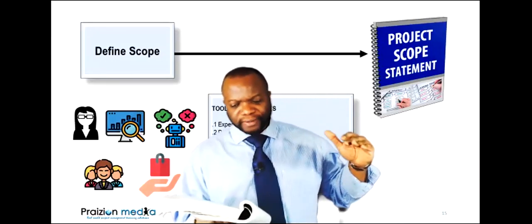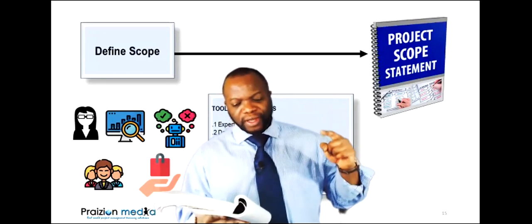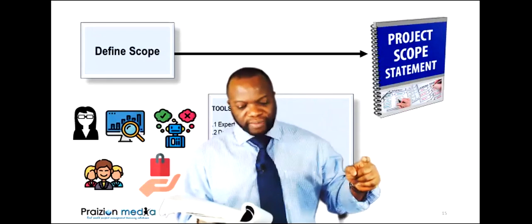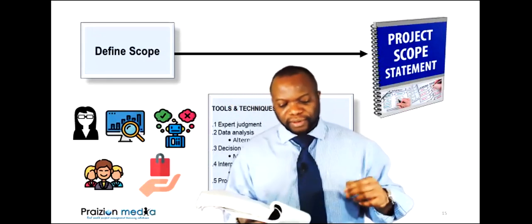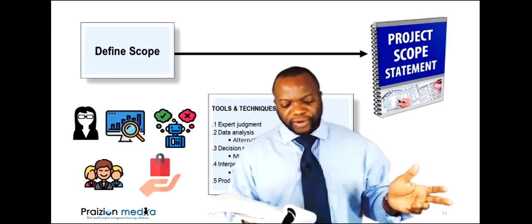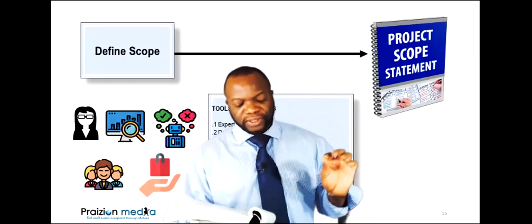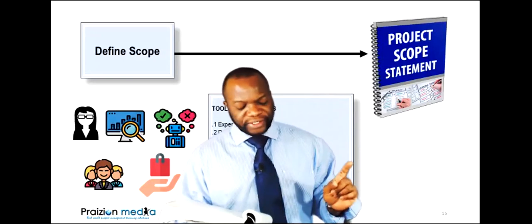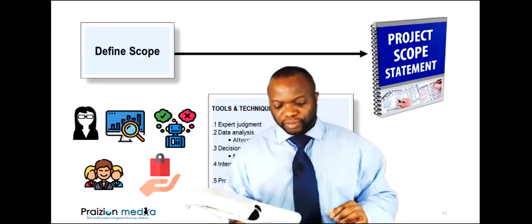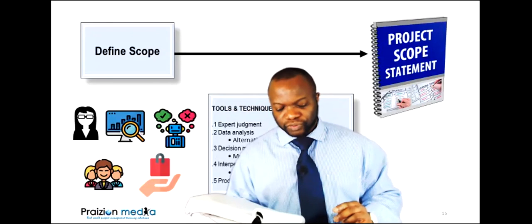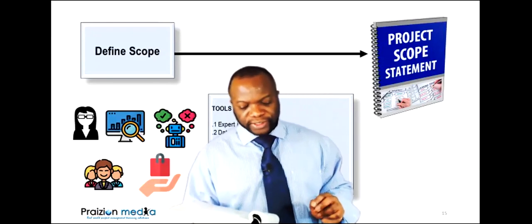The project charter: project purpose, measurable project objectives, high level requirements, high level project description, overall project risk, summary milestone schedule, pre-approved financial resources, key stakeholder list, not register, list, project approval requirements, project exit criteria, assigned project manager, name and authority of sponsor.